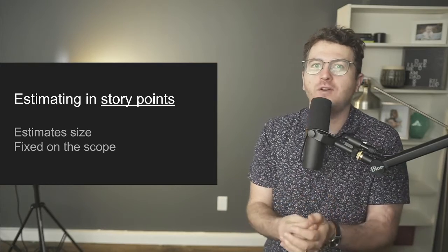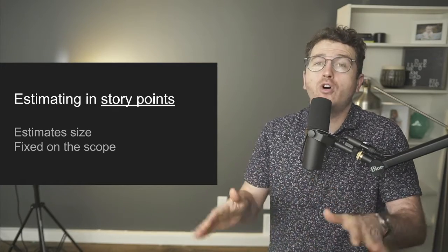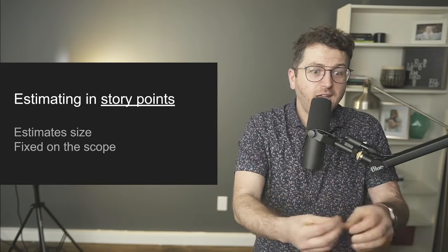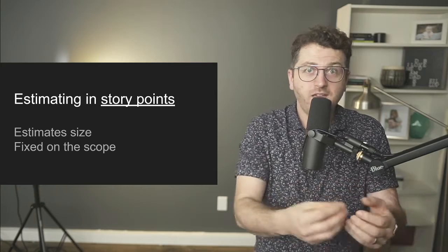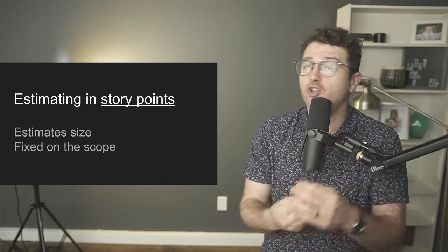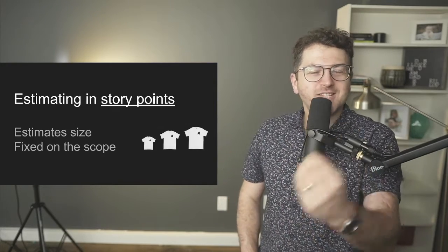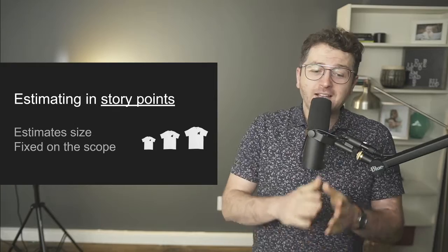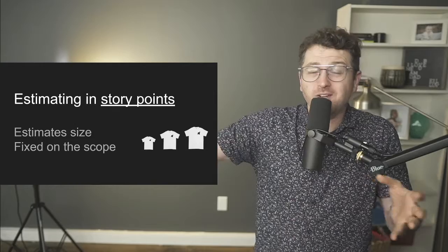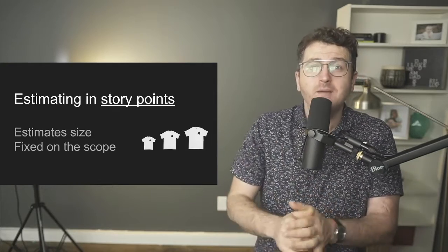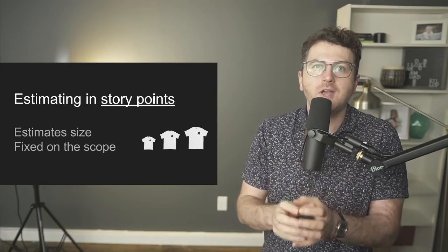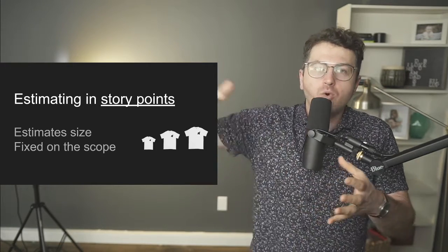What action needs to happen over there? So it doesn't have to do at all with the developer's ability of developing in itself, or if he knows how to do one thing or a different thing, if he's a junior or a senior. It's just about the feature in itself, how complicated it is, no matter if you're junior or senior. It's just about the size, like these t-shirts over here. As a feature is bigger and bigger, the distance between the estimations gets bigger and bigger as well, because of the ambiguity, because of the details that are needed, because of the risks that happen. All the little details are harder to grasp the more a feature is bigger.